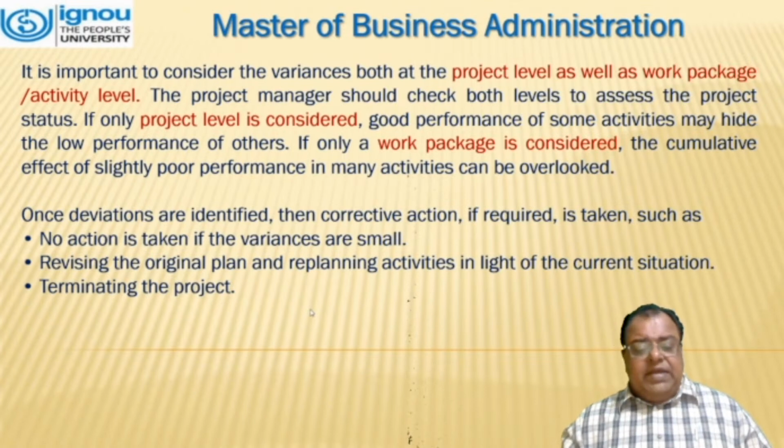Once deviations are identified, their corrective action, if required, is taken, such as no action is taken if the variance is small, revising the original plan and replanning activities in light of the current situation. And the third one is terminating.